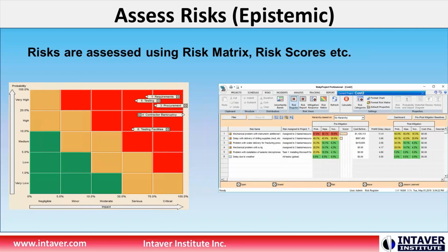You can also take a look, if you're doing a Monte Carlo simulation, there are different techniques to pull out the cost of each risk, and that gives you another quantitative measure about what the impact of those risks are and how much effort you should be putting into managing those risks. The thing about risk events is they don't cause a gradual slippage.